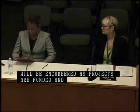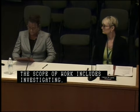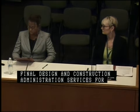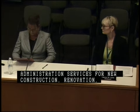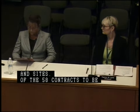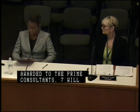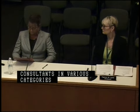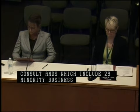The scope of work includes investigating, evaluating, and preparing certifiable assessments, studies and/or final design and construction administration services for new construction, renovations, alterations, modernization, and/or addition to various facilities and sites. Of the 58 contracts to be awarded to the prime consultants, 7 will be to minority business enterprises, 1 will be to a minority and women-owned business enterprise, and 8 will be to women-owned business enterprises. In addition, the prime consultants in various categories will carry sub-consultants, which include 29 minority business enterprises, 55 women-owned business enterprises, 2 minority and women-owned business enterprises, 1 veteran-owned business enterprise, and 1 service-disabled veteran-owned business enterprise.